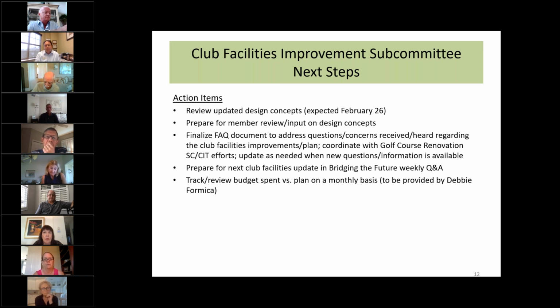That's where, in the milestone schedule that we talked about earlier on chart 6, by May we'll have both a revised estimate from the architect on the golf and a decent level of detail estimate from the construction side, so we can look at the two and look at the 110 per month and see how they fit and what adjustments need to be made.